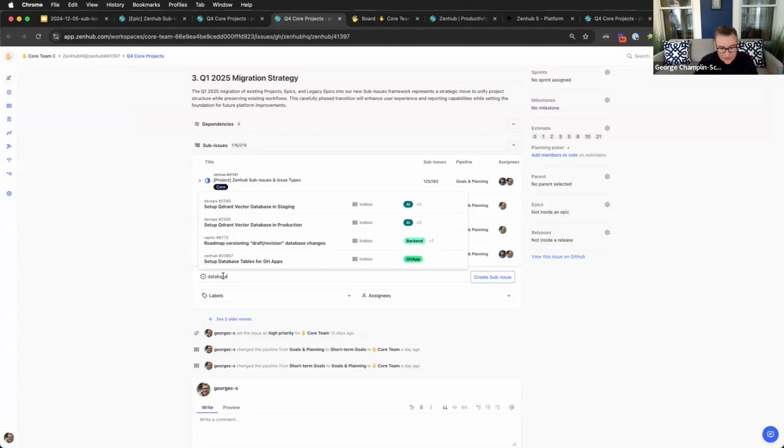So for sharing the work, your GitHub repository permissions are inherited and used. And that means that if you and your organization want to set up high-level goals that everybody can see, put them in a globally available repository. Create them as your highest level objective, add that repository to your workspaces, and now you have shared objectives across your entire business like that. Each team can then create sub-issues in their own repositories, allowing them to have control over the ownership of the body of work, while everyone across the org that has access can see the complete roll-up of everything.